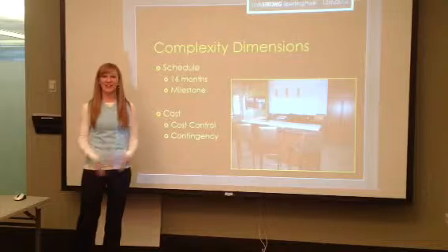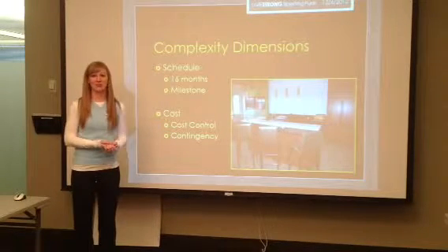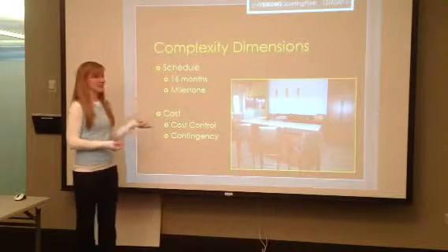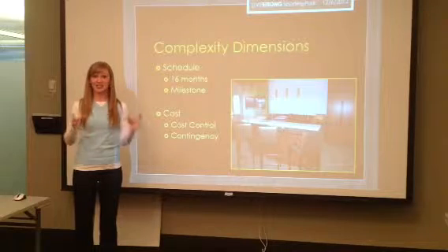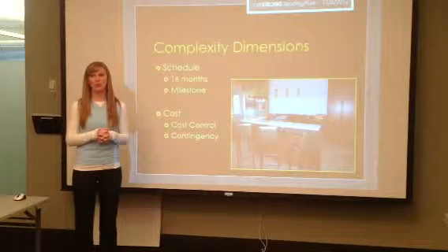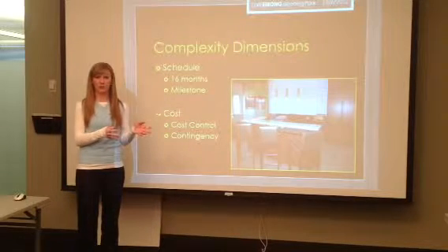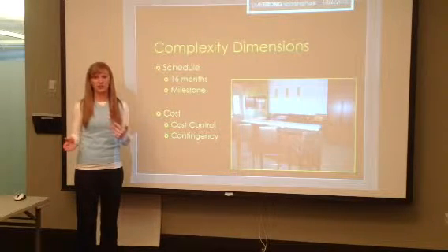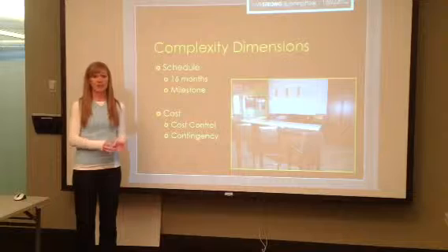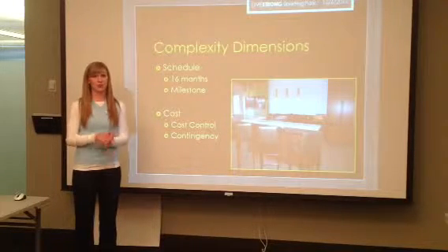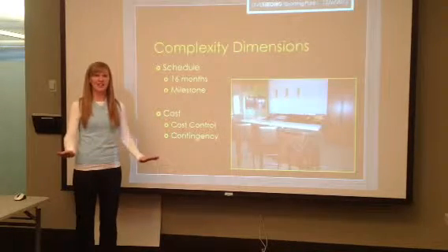Moving on to our complexity dimensions as we discussed in class, we'll first touch on the schedule. As you've seen, it's a quick, tight 16-month schedule, which means we were doing double shifts when we started excavating, earth moving, foundations, drill piers, and we also were working long hours when it came close to that first game to make sure everything was done.